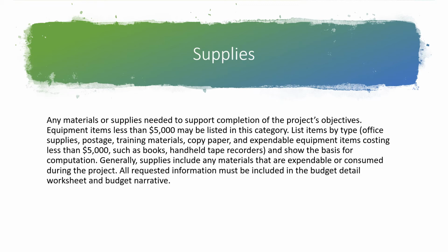Generally, supplies include any materials that are expendable or consumed during the project. All requested information must be included in the budget detail worksheet and the budget narrative. So remember, you're going to see in your budget everything. First, it's going to be in a chart where it kind of outlines, here's my costs, and then it's in a narrative that explains what we're going to use it for and why it's important and why it's worth investing money.